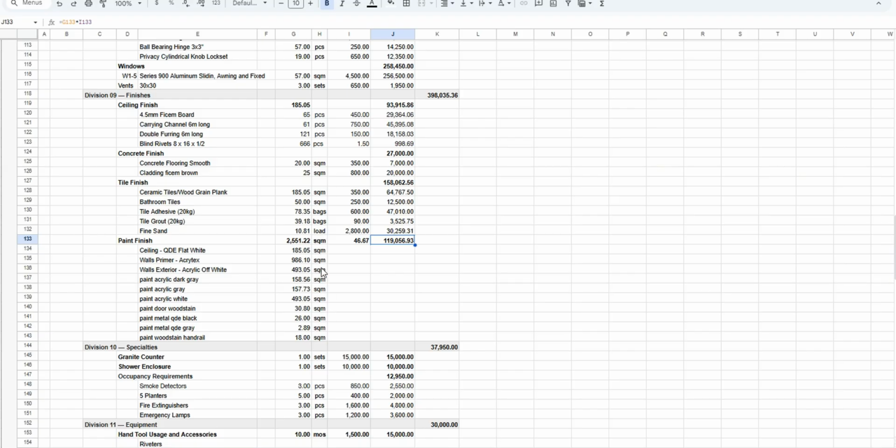Of course, because if you're in the schematic stage or development stage, it's still okay to do by unit cost, per square meter or per lump sum. But as you are finalizing it for construction and the total construction cost, it needs to be the exact amount as you would buy in the hardware, such as this one, 65 pieces, and then you can offset it for breakage aside from your OCM.